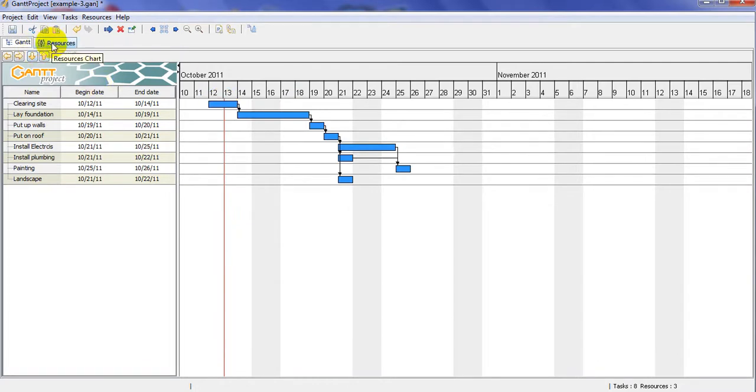And the final solution for this case would be perhaps you change the timing of here, or change the dependency if it's possible. So we have to see which is the best solution. Or basically another way is that we have to remove that 2 days off from student number 1. So anyway, I continue adding all until we end up here.